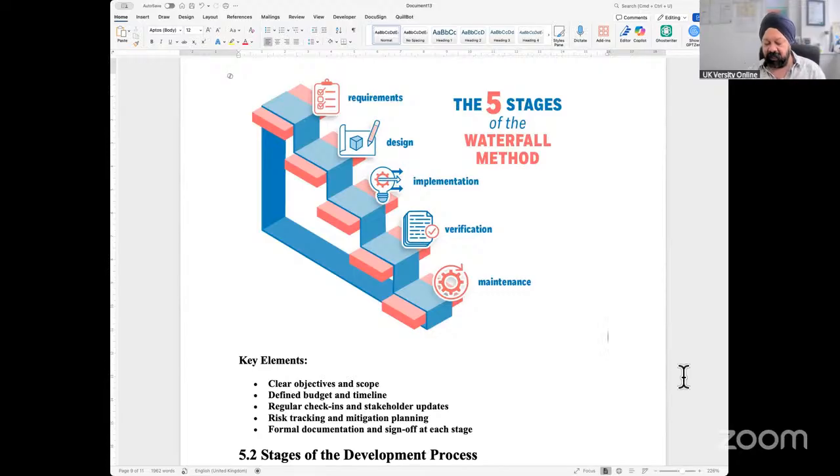We know exactly how this will work because we've trialed it out, we've tested the software out, we've tested the hardware out, and obviously that is what the IT department does if they are implementing something to move the organization from one phase to the other. So in some cases, it won't be that they will buy 500 PCs or start working on this. They will buy 1 or 2 first, install, run, and debug, and check if it is meeting the requirements, and then slowly and gradually they will start ordering.